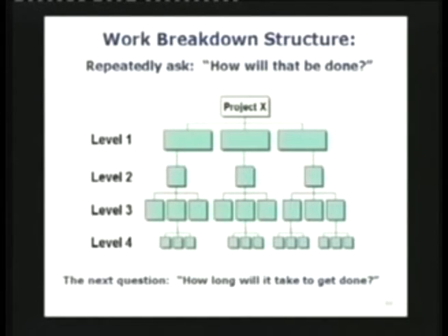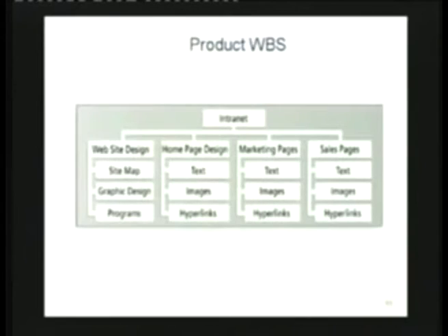And these things come from experience. I'm pretty sure if I sat with you, if you're discussing ERP software with me, and I ask the questions, you'll be able to identify the modules right at the end. You'll say, these are the modules, sir. You've got to build them together. And this is the beginning of sequencing, because not all these things can be done all at once. But they are all independent. The dependency is only vertical. And wherever they interface, that's when the units come together to make a subsystem or probably a whole system.